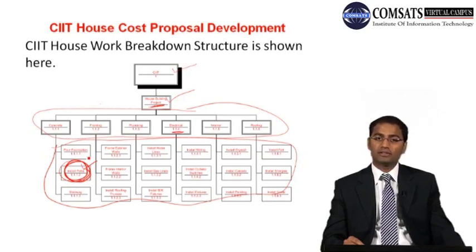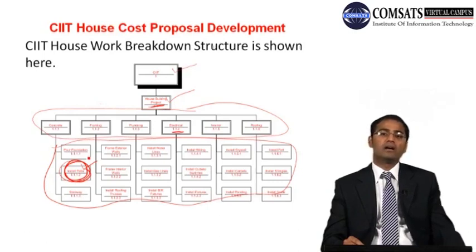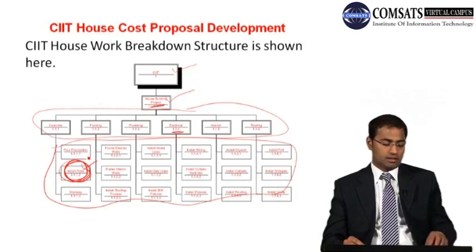For all these resources we consider the prime cost, then overhead cost, and fringe benefits and stuff like that, and then we move towards the total cost, and then we add fee, and then we get total price. All the prices of single resources are summed up to get the total cost of an activity or work package.